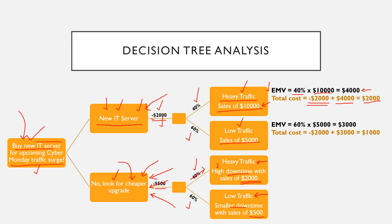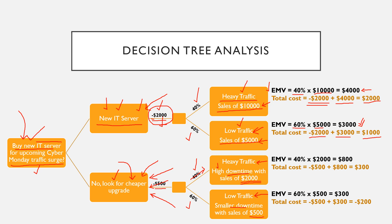For the new IT server with low traffic scenario: there is a 60% chance of making $5,000, which equals $3,000. Total cost is minus $2,000 (the server cost) plus $3,000 (expected sales), giving an EMV of $1,000 for the low traffic scenario.